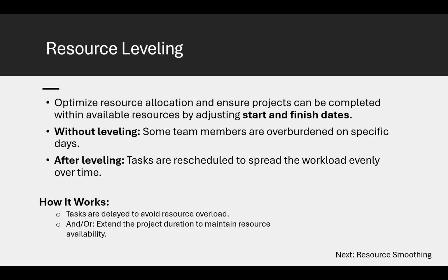So how does resource leveling work? Tasks are delayed to avoid resource overload. That happens if the task can be delayed. Another way it works, or extend the project duration to maintain resource availability, if you have that option where you can adjust your finish date.